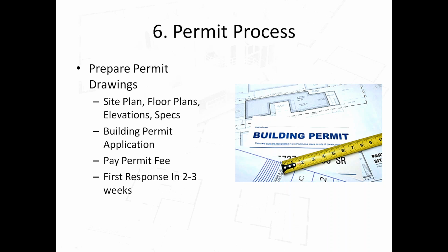Okay, so if the subdivision was, let's say, put in 1956 and there's a plan number on the listing of that property, they might say plan number, I don't know, 250. You go into the registry office and look for plan number 250, and then you can see an overall plan of the entire subdivision.